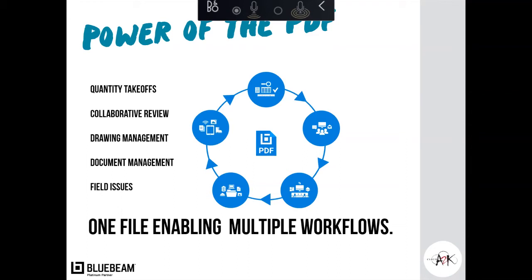We can overlay different sites, different PDFs on top of each other to give more of a 2D Navisworks feel, I guess you could say, when we only have the drawings. We also have drawing management tools such as our sets, where we can continually add more and more different revisions of drawings and see the actual project grow and all the different changes to the drawings, and also push out markups as a part of that process and see the history of that actual drawing development. So some really powerful tools there.